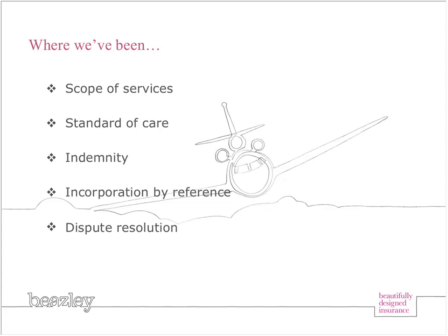So unlike mediation, where at the end of the day, if the parties don't reach an agreement, you can walk away and then proceed to litigation. In arbitration, there is going to be a decision, and you are going to have to live with that decision, which leads me to the second big problem with arbitration, in that it is generally not appealable. Unlike litigation, where you have rights of appeal, in arbitration, appeal rights are extremely limited and generally limited to things like fraud by the arbitrator. So you're kind of stuck with this opinion.